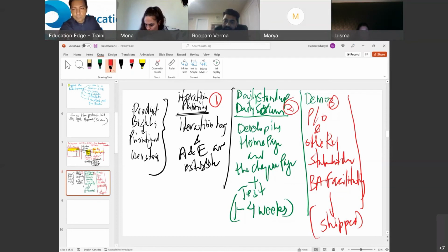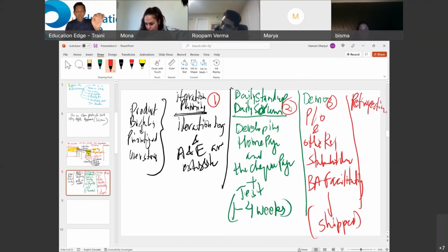And the team quickly does 1 or 2 hours of retrospective, or retro, to understand what worked well, what did not work so well, and what are the opportunities for improvement. The product owner decides whether they should release it to the customer, or the product owner may say, guys, hold on, not right now. We will have another iteration and then one more iteration, and then we will.